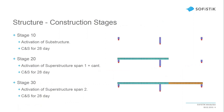For the construction stages of the structure, three main stages are used: 10, 20, and 30, rather than 1, 2, 3. The reason is simple — in ongoing projects it's often necessary to insert additional stages, so keeping gaps in the numbering allows stages to be added later. The recommendation is to always keep gaps and avoid sequential numbering like 1, 2, 3, 4.